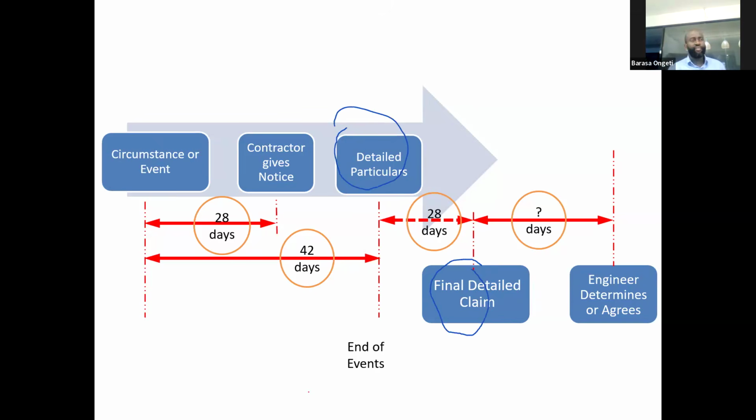And Kataboy asked about timelines. If you sign a contract, you agree to the terms of that contract, subject to applicable law. So if there's any conflict, it is upon you as the engineer to clarify which one prevails. Is it the timeline in the contract, or is it the timeline in the governing law or the applicable law? Ordinarily, the law takes superiority, but I've successfully argued a case where the contract took superiority because we signed the contract. So we didn't sign the law. The law is for somebody else. We signed this contract and we won. But ordinarily, the law takes superiority.